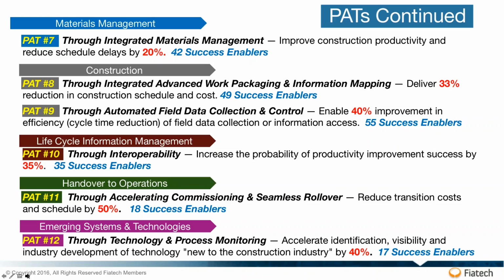One of the points on PAT number 11, which is green near the bottom of the screen here, is we were talking about handover, and one of the owners pointed out that they really want to have processes and activities in place that actually don't use that term anymore. They want it to be so clean and so smooth that you start talking about seamless rollover. So the car is already moving forward effectively, and someone else takes the place of the existing drivers, which would be the EPCs, and starts driving it. And these new guys are the owners and the operators, and it's essentially a smooth transition. It turns out that it's very costly, much more costly than we had anticipated for handover. So the notion of seamless rollover is the desire on that.